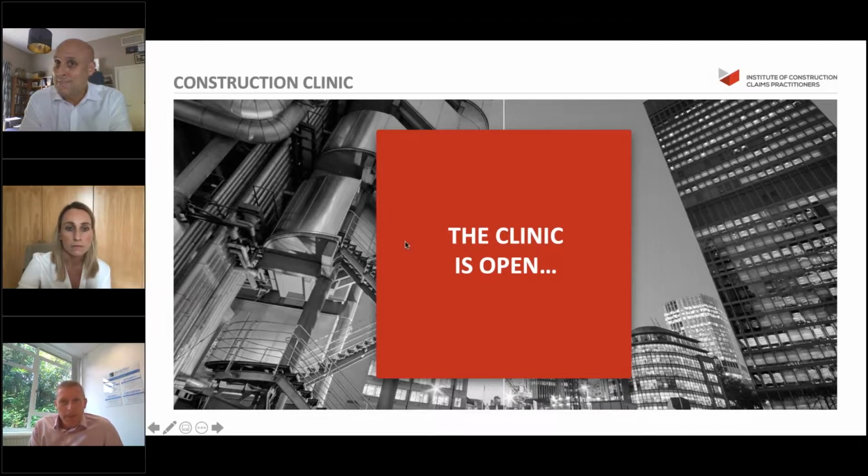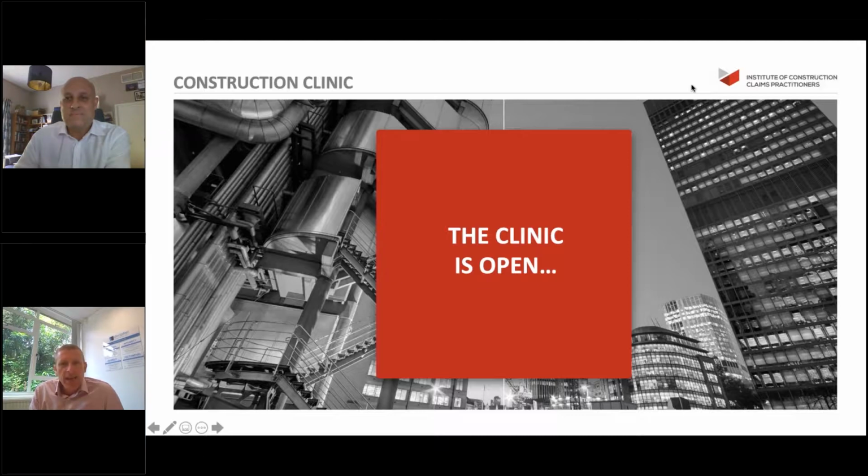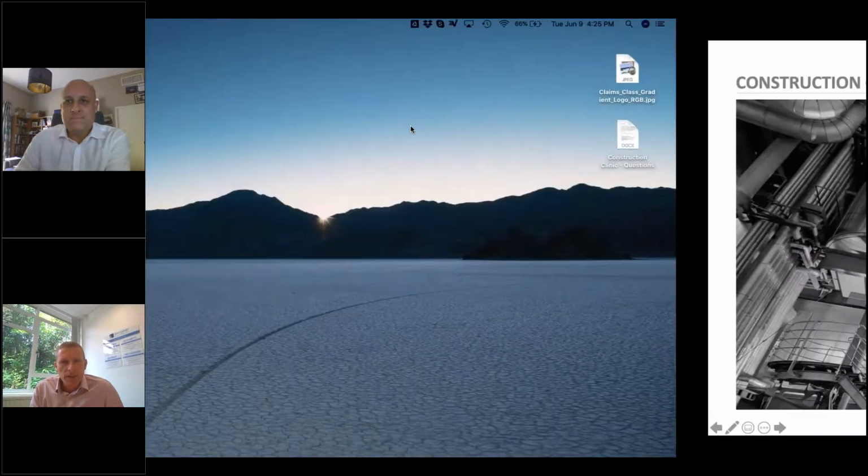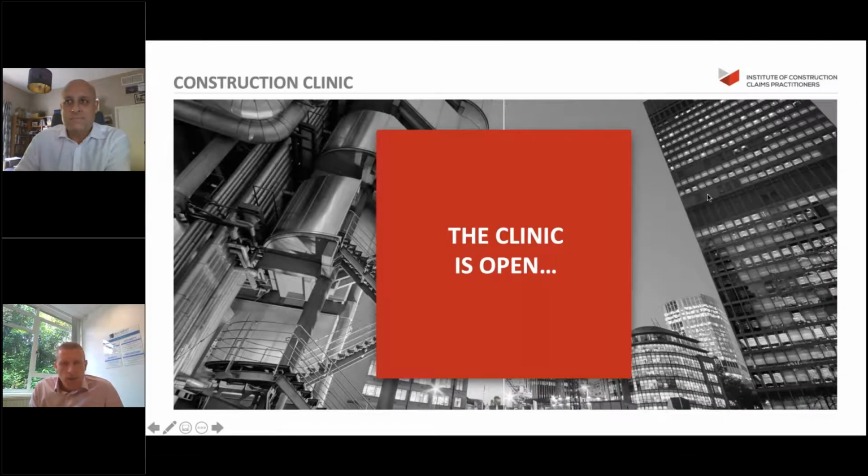Wow. Okay. I'll have a go at answering that one. I think we would always suggest being very, very careful of the bespoke conditions. What you need to be very mindful of is that people understand what standard forms are. So with regards to the FIDIC and the JCT and the NEC, particularly around notifications and time barring clauses and what you need to do with regards to making your entitlement stick.